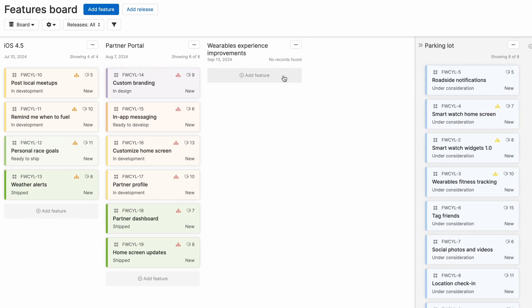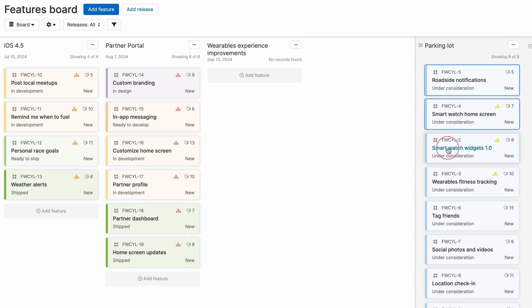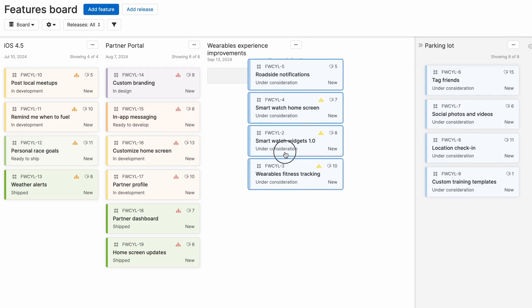There's a few ways that you can do this. You can add new features directly to each release. And if you're just setting up your AHA account, you can also easily import items from other systems. In our case, we're going to simply drag and drop features from the parking lot into this release.